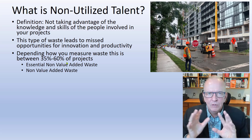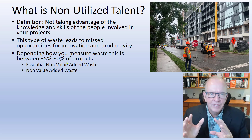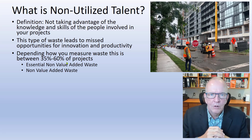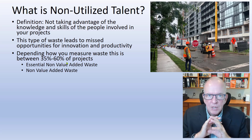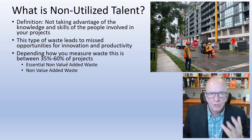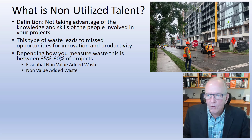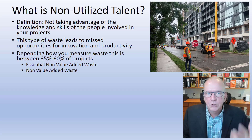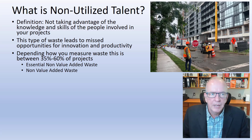There's a lot of research out there, and they're in that 30 to 40% zone for what we call non-value-added waste — pure waste. Value-added is when we're actually building: the curtain walls, concrete floor slabs, columns, shear walls, kitchens, elevators — that's the product we need at the end of the day.